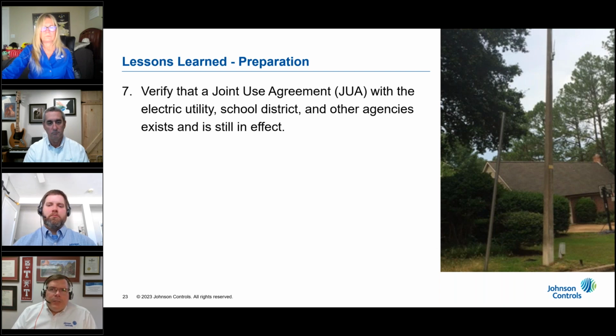Unfortunately, no such agreement was in place, and for reasons unknown to us, an agreement could not be negotiated. Worse, the problem did not surface until project installation, and the AMI system provider had to scramble to redesign the entire network and locate new assets and erect towers and poles onto which to mount collectors and repeaters. I can tell you from experience that it is neither cheap nor easy to erect a communications tower.